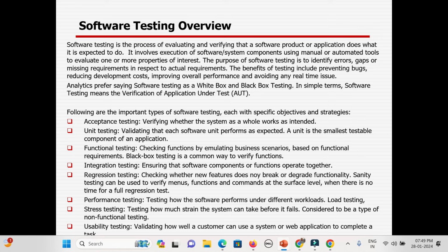Issues coming in the later phase means it will increase the project overhead cost. So that is the reason, as part of project management or the project life cycle, to reduce the issues or defects, and in case something comes, let them be fixed at the earliest stage of the project. That is the way the overall cost and overall problems of the project can be nullified or reduced.